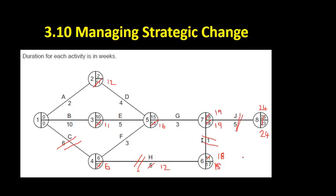And that's how you amend a network analysis diagram. Look at what it does to the critical path, look at what it does to the overall length of the project, and if you've got any information like a target for the completion date, then that information should be included in your answer.